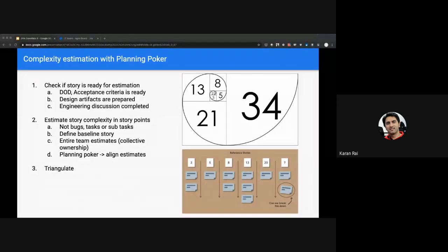So what that means is in the first few sprints that you do, your estimates of how many story points you can complete very likely will be off from the actual velocity. But what it will help you do is keep refining with every sprint how many story points you're actually able to achieve, and then that will set your baseline velocity, which you can expect to work with.